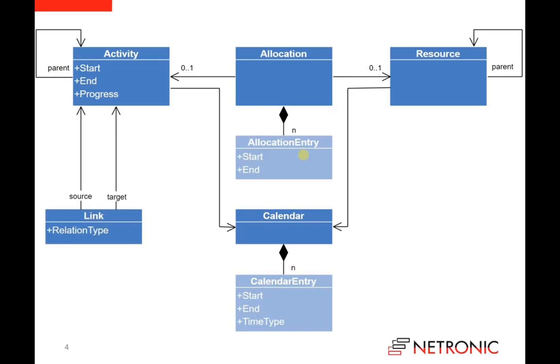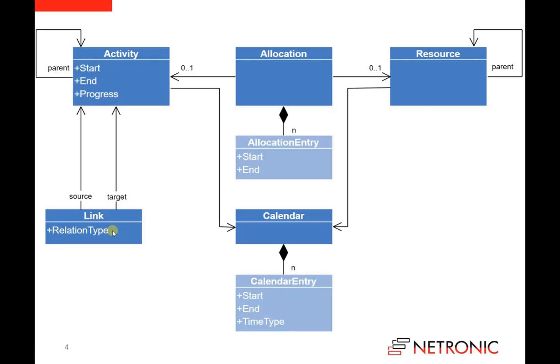The next important type of our model is the link object type. Links represent relationships between activities. So each link has a reference to a source activity and a reference to a target activity, and in addition we have the relation type property to define whether the link represents a standard end-start relationship, or for example, the start-start relationship, and so on.